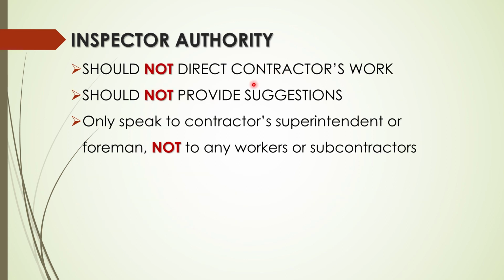Should not direct contractors' work. Don't tell them how to do it, because you may think you have a better way of doing it than he's doing it, and you just took responsibility of his work. Should not provide suggestions. No, that's kind of a gray area.